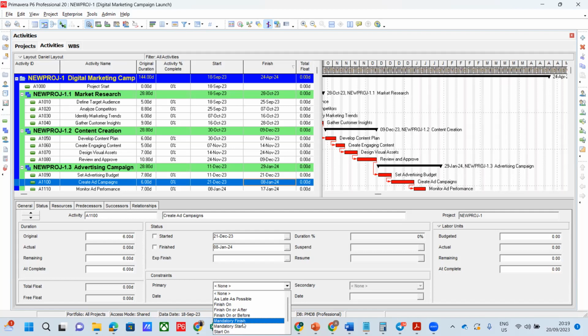Even though those sets of activities were critical before, some of them, before that day, will become not critical because you have some days to play around with. But hard constraints would definitely force those activities onto the critical path. Maybe you have an activity that was normal logic, and you put a hard constraint.